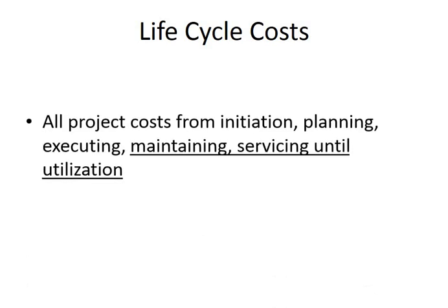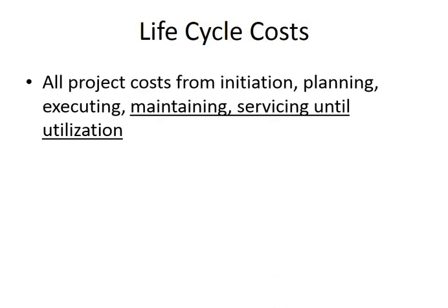So in terms of some kinds of projects, if your product is to, let's say, develop and prepare a computer system that you are going to use, let's say 10 years, then what is important is that not only the cost of acquiring the system matters, but also the costs of maintaining it, servicing, expanding and so on may be important.